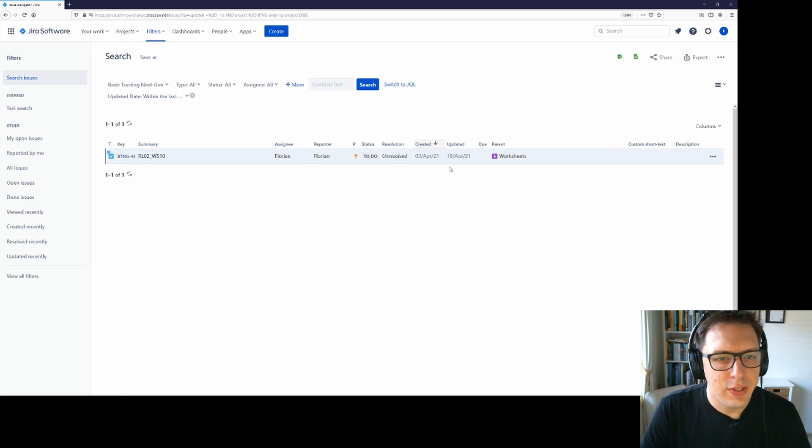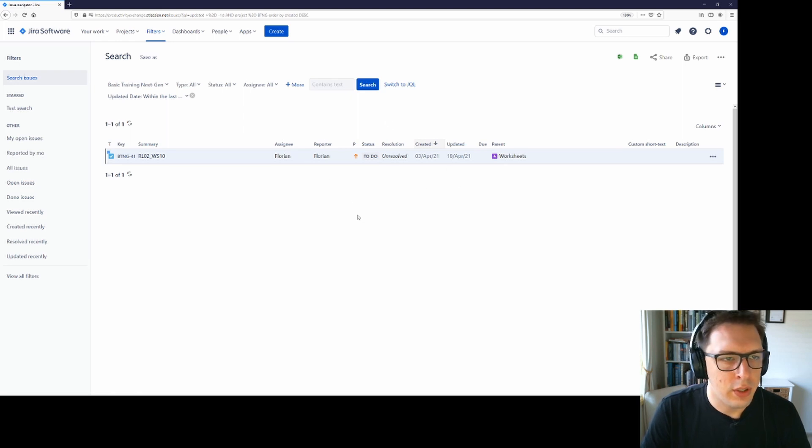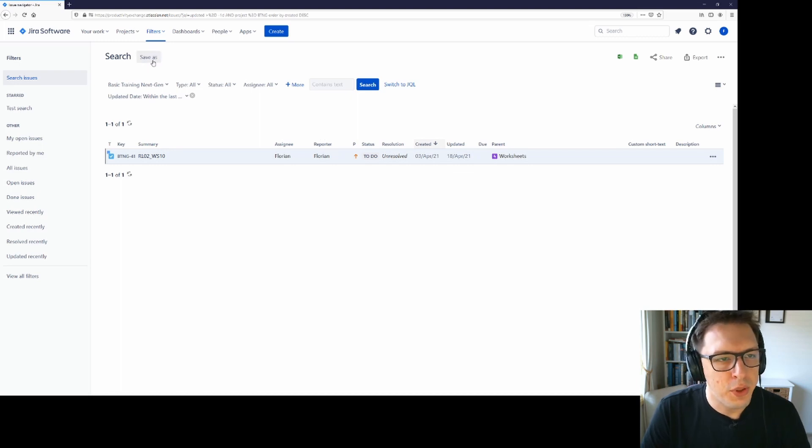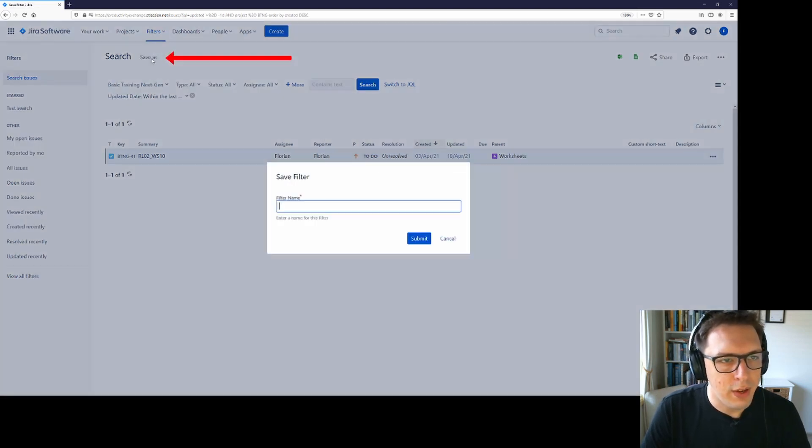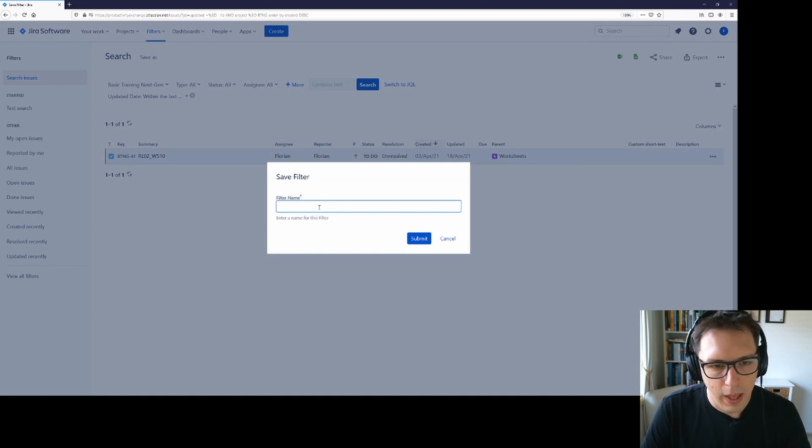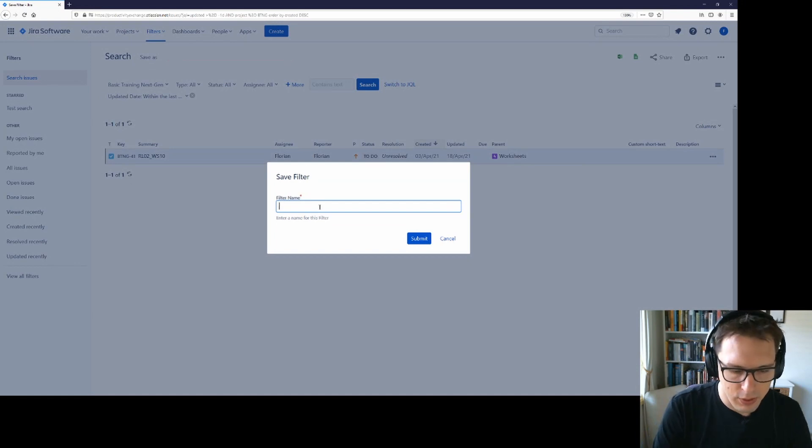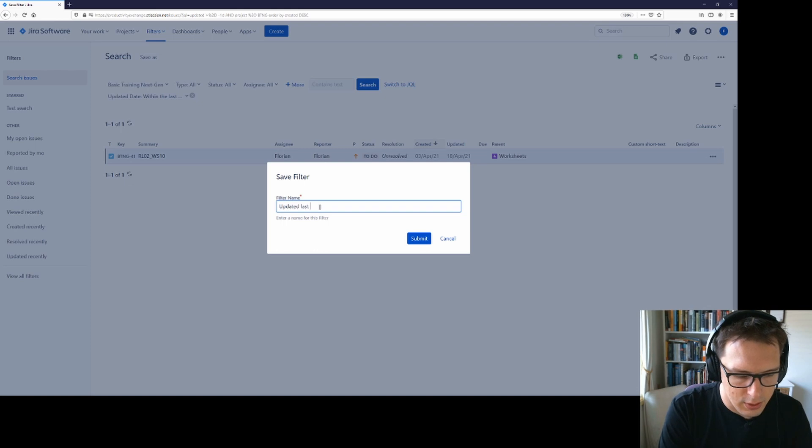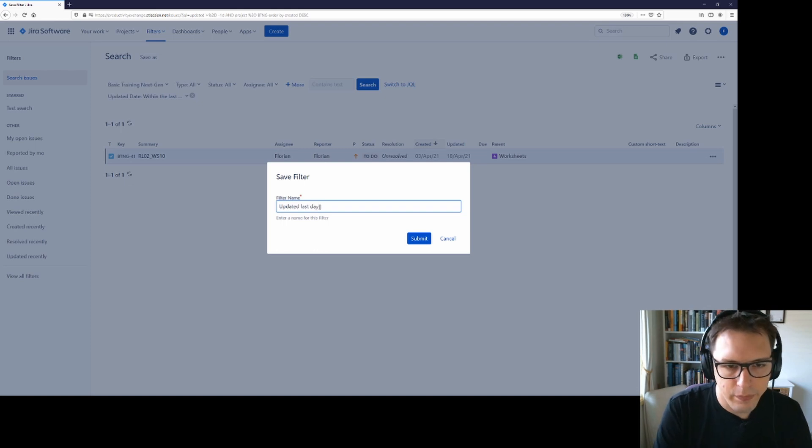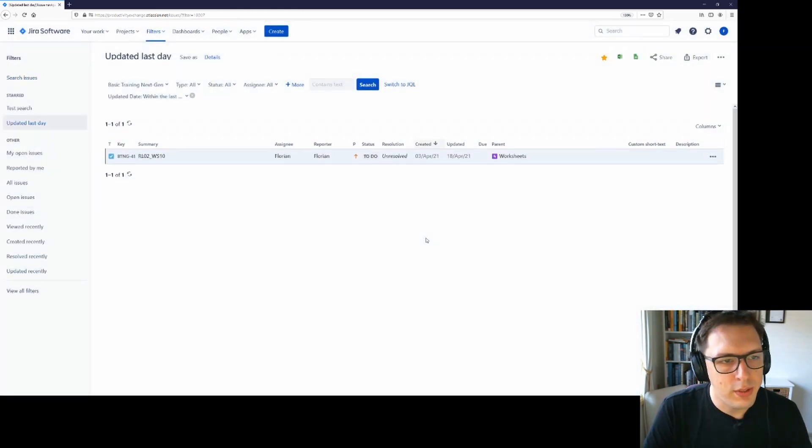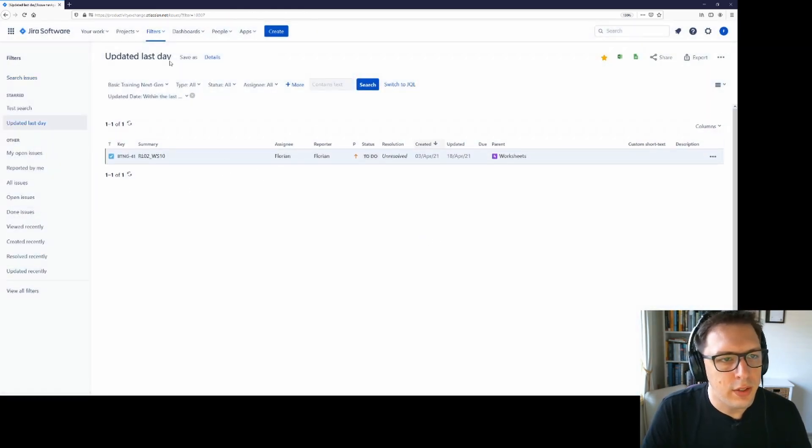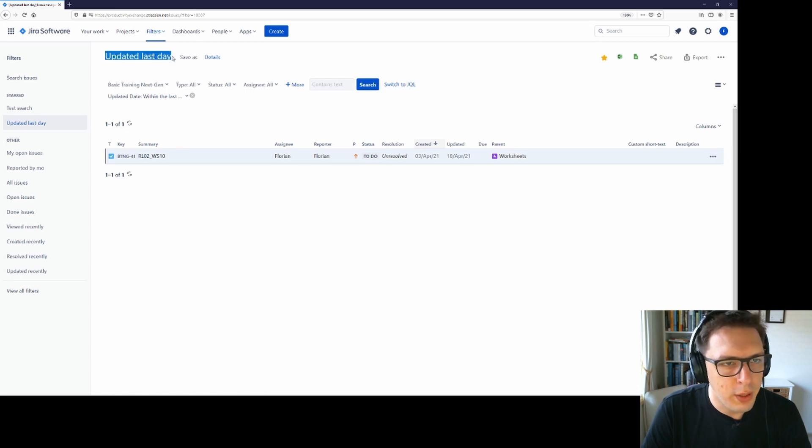Now say I regularly want to check this filter. I don't want to have to manually set this up every time I go in. Jira provides us with a way to save these filters. I can just click save as and then type a name for this filter. So I can say updated last day, there we go and I submit that.